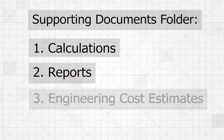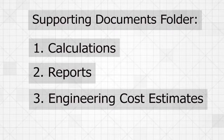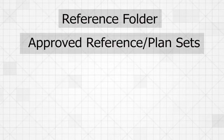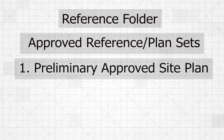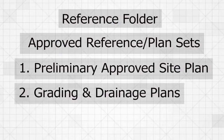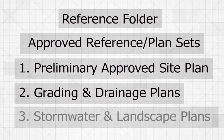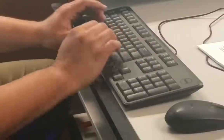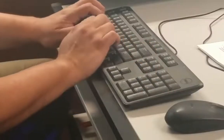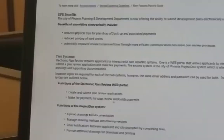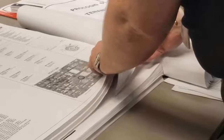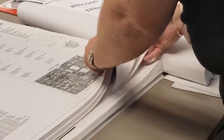The supporting documents folder includes documents such as calculations, reports, engineering cost estimates, and cut sheets. The reference folder is for approved or reference plan sets, such as the preliminary approved site plan, the grading and drainage plans, stormwater, and landscape plans. Customers often upload everything in one folder, which takes time for the reviewer to separate and organize, and therefore adds time to completing your review.